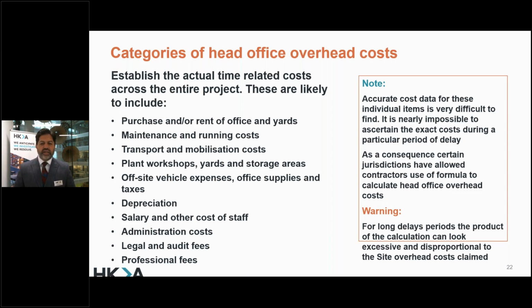And such head office overheads are normally taken as being recovered out of the income from the contractor's business as a whole. So when completion of one project has been delayed, a contractor may claim to have suffered a loss arising from diminution of its income from the project, reducing the turnover of their business. Despite this, the contractor continues to incur expenditure on head office overheads, which it cannot materially reduce, or in respect of the project can only reduce, if at all, to a limited extent.